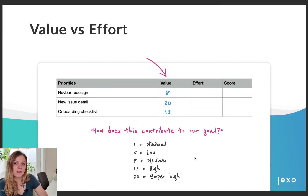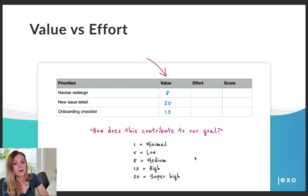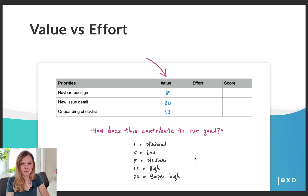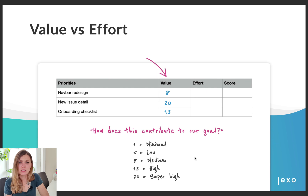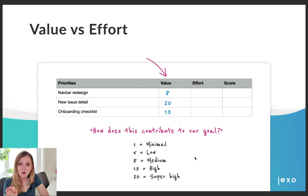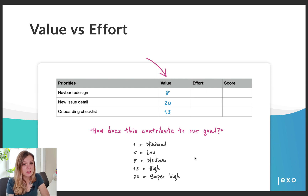Let's have a closer look at the Value vs Effort method. I have here an example of three priorities we are going to work on. With this method there are two key metrics you need to identify for each priority: value and effort. When filling in the value metric, ask yourself: how does this contribute to your goal? In our case, we assign medium value — equal to 8 — to our navbar redesign, super high value to new issue detail, and high value to new onboarding checklist. Each option has its own numeric equivalent, which is important as it helps calculate the priority score.